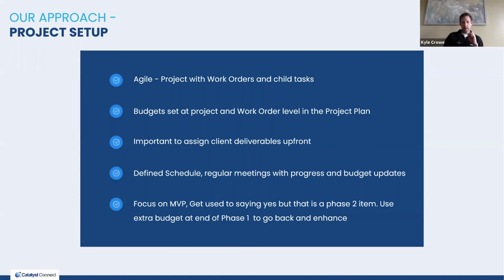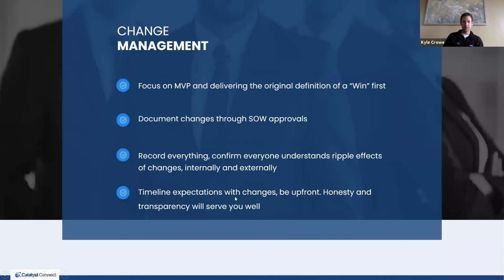Yep. And the one point I'll add here, to Peter's point, we try to get a paid discovery up front so we can properly scope any type of project or task. But it's not binary, especially for some of these really large projects like a data migration or an API integration. We are continually reviewing our estimate and our actual work internally on a weekly basis. And if we realize that we did underscope it, we try to bring that to the client as early as possible. If we had budgeted 100 hours and it's looking like it's going to take 125 or 150, it's a lot better to tell the client that when you're at the 25 or 50 hour mark as opposed to the 100-hour mark.